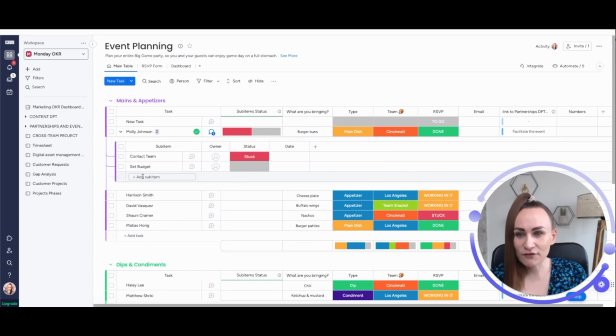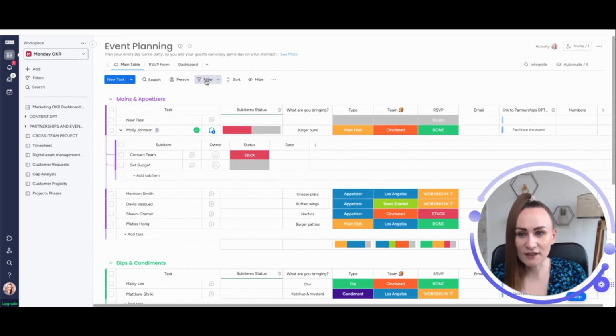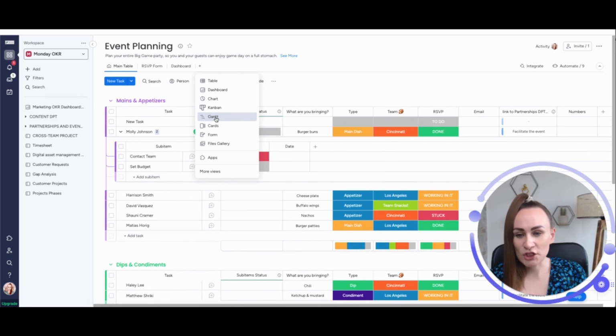And the final thing is, in the Gantt chart view on Monday.com, you can't see sub-items. So if a sub-item represents some really strategic item that you want to see in your timeline and in your Gantt chart, you can't. So those are the three main things that everyone needs to know about the sub-item limitations on Monday that still exist now when I'm making this video.